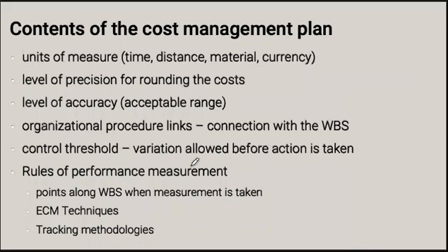So units of measure. So what are we measuring and in what units, so that when we are providing quotations or when we're costing things that are being measured, we know what we need to measure it in. So for instance, if we talk about travel, how much do we charge for travel? Is it per mile or per kilometer? And what's the associated cost, so that we can use those quantities, units of measure, and maybe costs associated with those units of measure in order to create costs.